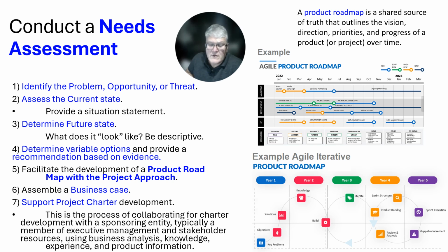Next, step 5 would be to facilitate the development of a product roadmap. With the product roadmap, you would need to be knowledgeable on the different types of approaches, like I talked about in the first lecture. Whether you're going to use a waterfall approach, an iterative approach, an incremental approach, or a hybrid approach. And if you notice on the right side of the slides, I have a definition. A product roadmap is a shared source of truth that outlines the vision, direction, priorities, and the progress of a product or the project over time.